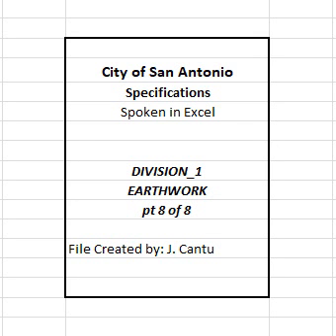A. Cement. Cement will be paid for at the unit price bid for cement. This price is full compensation for materials, delivery, equipment, labor, tools, and incidentals. B. Cement treatment. Cement treatment will be paid for at the unit price bid for cement treated subgrade, for the depth specified. No additional payment will be made for thickness or width exceeding that shown on the plans.